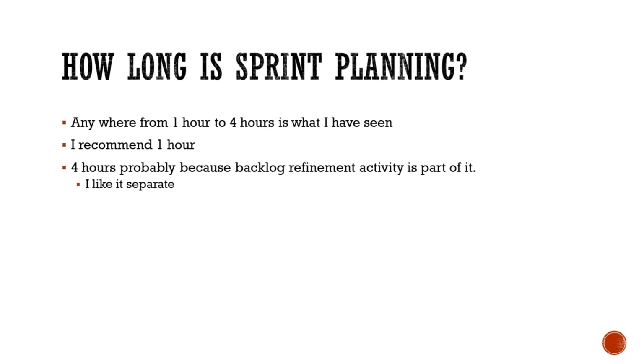There are some teams whose sprint planning includes backlog refinement activities. Usually I don't like doing that. I like coming into sprint planning where we have done all our backlog refinement and our stories are all well groomed. Check out my earlier video where we talk about backlog refinement. So ideally it's a matter of just coming in and doing sprint planning. If that's the case, then it shouldn't take you more than an hour. So for 2-week sprints, I expect about an hour.